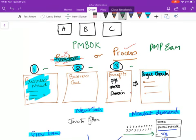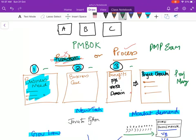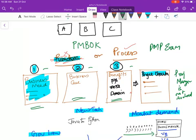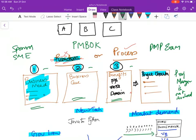During the business need, business case, and the benefit preparation, and the project charter, a project manager is not involved. Sometimes for only the project charter, the sponsor might collaborate with him. But for a business need, for a business case, and benefits plan, a project manager is not involved. It is done by the sponsor or some subject matter experts or some executive level people.